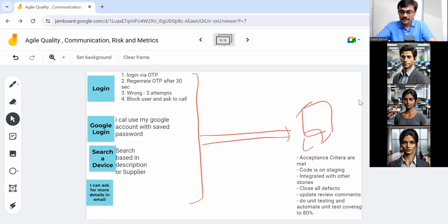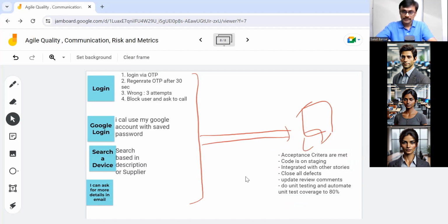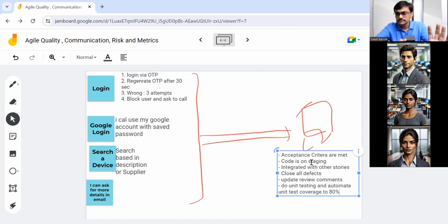It may be a silly question, but do we ask, as a coordinator or a project manager, the developer to put a comment while finishing the task, like whether he or she has completed the unit testing or not? How will all these things get converted into some mechanism? Now, what could be a mechanism? You may have a task in Jira which says DoD checking. Someone does a DoD checking, or you may have each DoD item as a task in Jira.